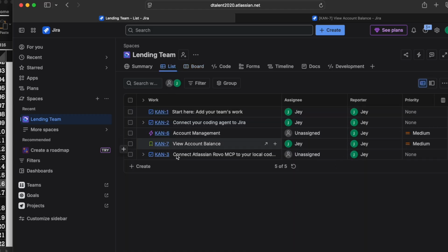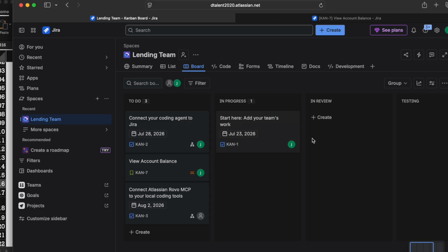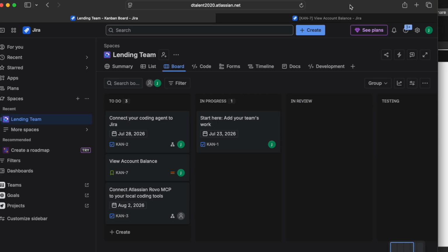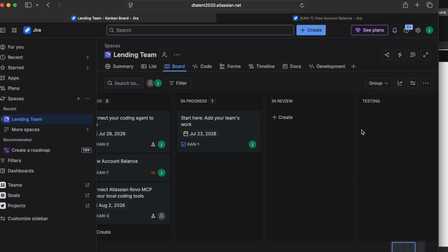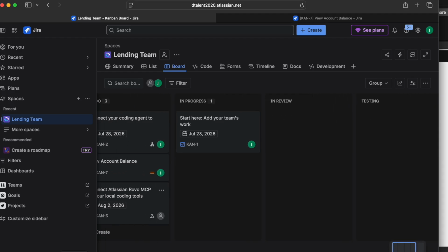So business analysts create all the items here in the backlog, and as a team you plan, and the product owner will prioritize what tasks go with the sprint, and you start a sprint, and you can see everything on the board, right? So you can pull up one task and work on it, send it to review and send it to testing, so that the tester will test it and it will go to done, right? So you can nicely track and visualize it.